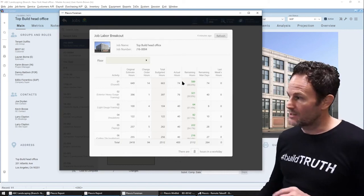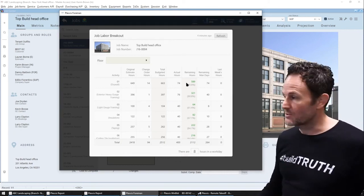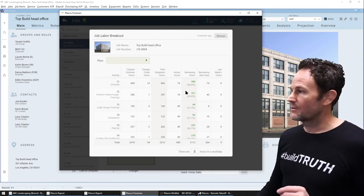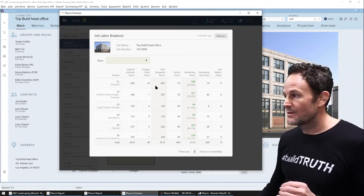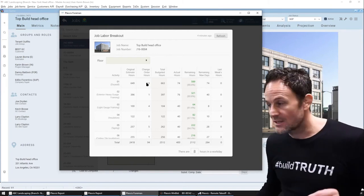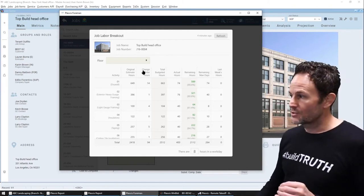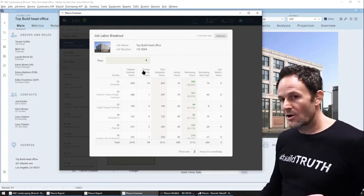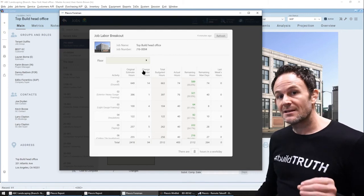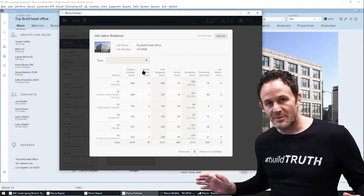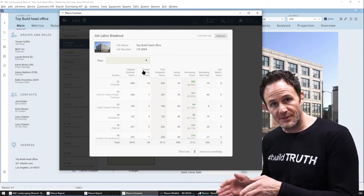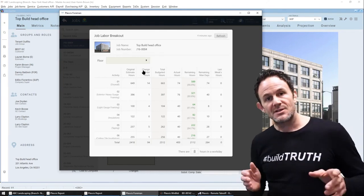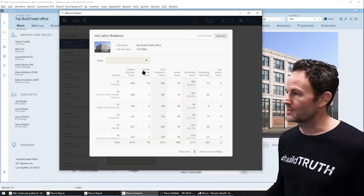And here's one of my favorite examples. They'll get a live labor breakout on the job with remaining hours and remaining man days. But because of the live connection, the change orders are impacting the budget with pending and approved change orders. So if you've got those pending agreements where you've started the work in the field, but they're not approved yet, they still impact the budget, but they don't hit billings.